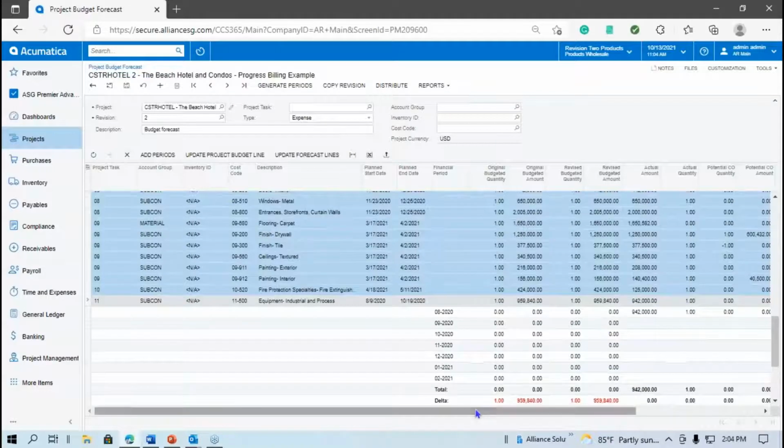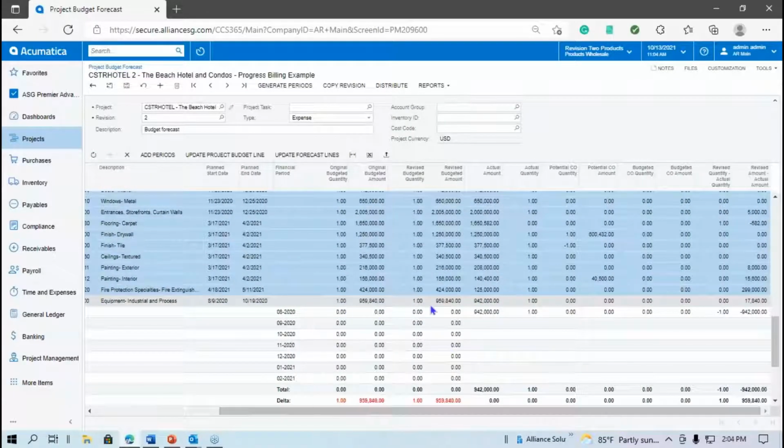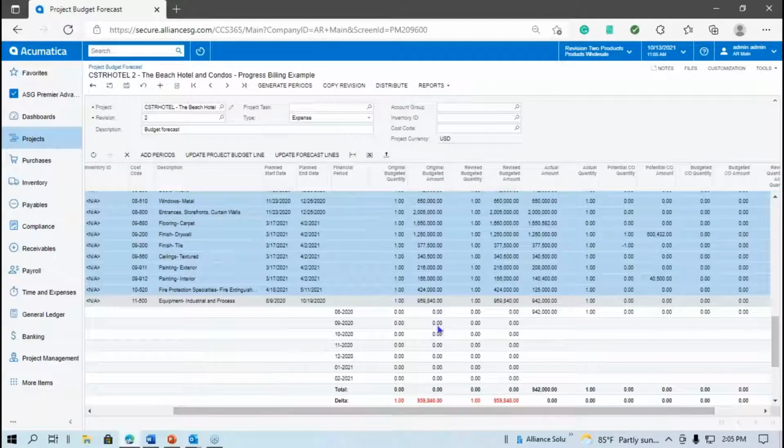So what I see when I'm looking at this is I'm seeing across the top what I have in the system currently. That is including the revised budget and my actual amounts, along with any change orders we might see. But now I can either go ahead and just say, I want to spread this out, or month by month, I can say what I want to do with this. So as we come in here and we click into a field, I can tell this that, this month we're only going to do $20,000 out of that cost budget.